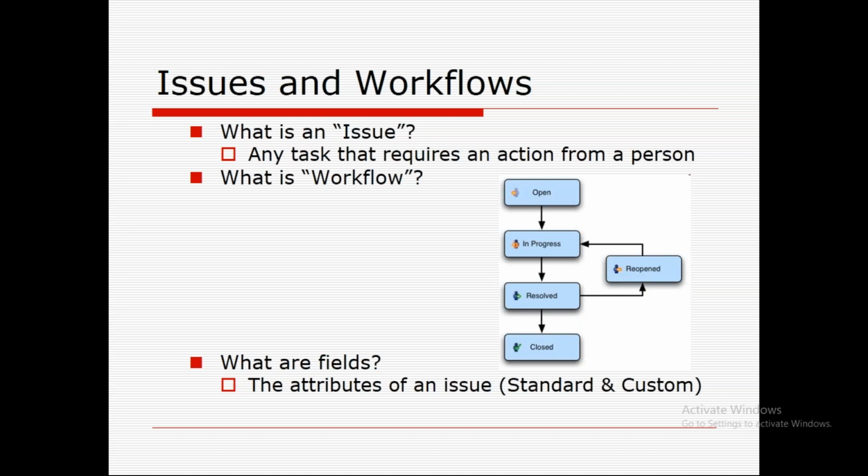So what's the workflow? The workflow consists of the various stages through which an item will move before getting closed: open, in progress or in development, development complete, in review, tech review complete, in testing, verified, resolved, and closed status. Similarly, you have a simple workflow presented here.